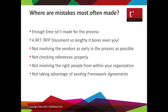Information security involvement is critical — if you want to host software within your organization, does it fit your architecture? Can it link with your internal systems? If you host externally, does it match your information security standards? What can happen is you pick a solution, and just as you're about to get approval, something comes up and you have to start from scratch. Finally, look for framework agreements — in the US, many states have purchasing frameworks where you can get three quotes and go through the process very quickly.